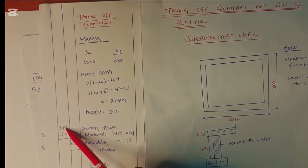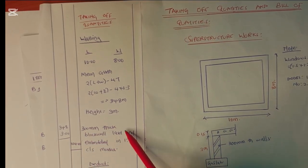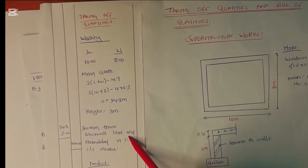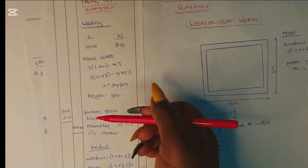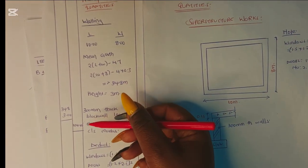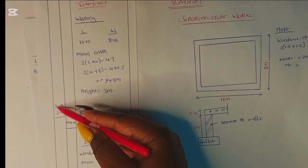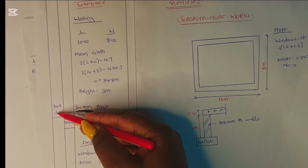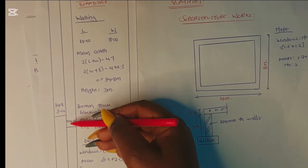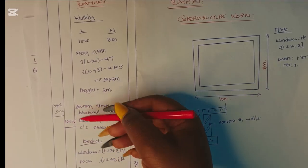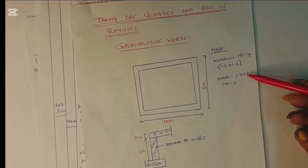We book that as 34.80 by 3.00, described as 300 millimeters thick block wall laid and embedded in 1:3 cement sand mortar. To prepare the BoQ we need the volume, so we multiply 34.8 by 3.00 to get 104.40. This is what we carry to our BoQ, but remember we have some doors and windows.